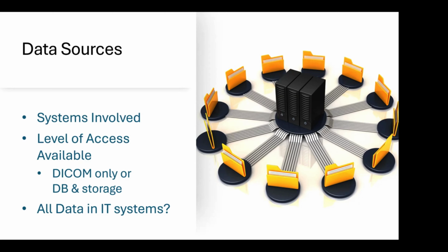But this is typically many times faster, and it also has a great reduction in the processing impact, and the database impact, and everything else on the legacy system. But it's not always available. It does depend that you can give storage connection to the data migration engine, and that the legacy PACS vendor will provide the database access.